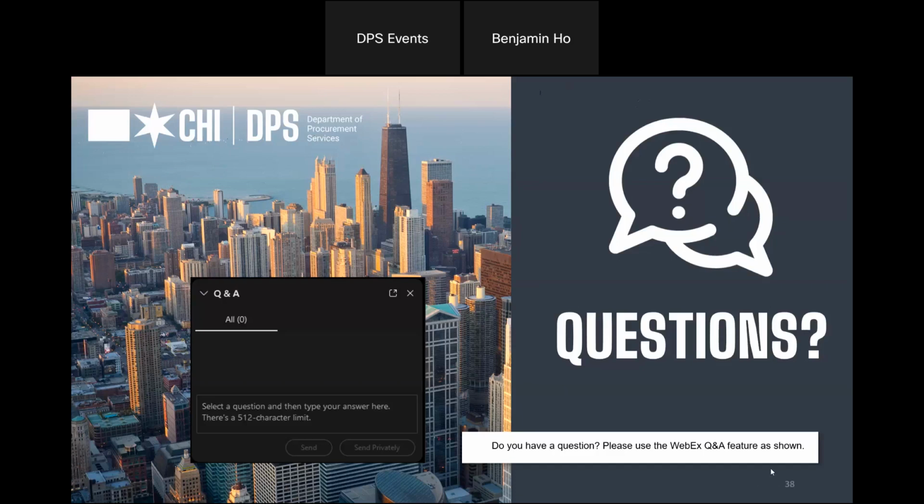So please don't wait to the last week before a bid is opening. As soon as the bid is advertised, we recommend that you get registered and then download the bid, look through it, and then participate in any pre-bids, and get your bid at least ready the night before.